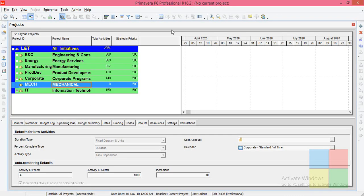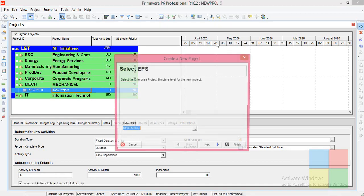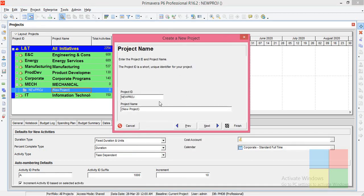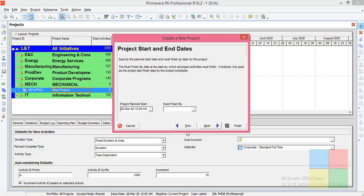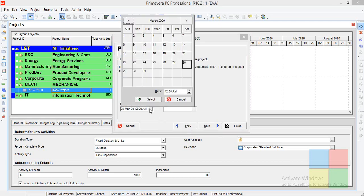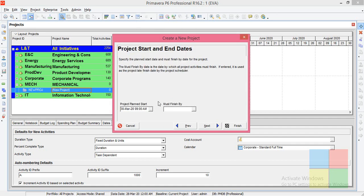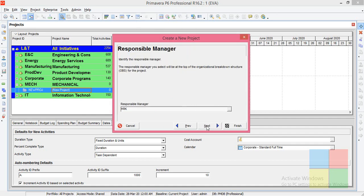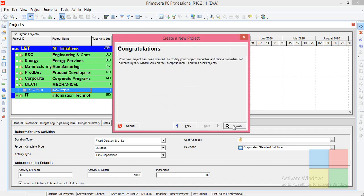Under the mechanical EPS I will create a new project. Click on Next, click on Next, enter a random project ID and project name. Click on Next — the project plan start is going to be 30 March, 9 AM. Select Next, Next, Next, Finish.